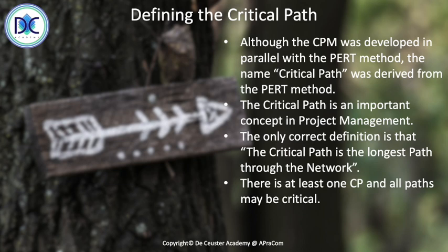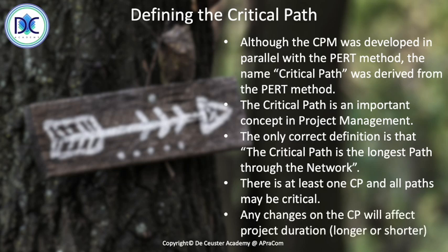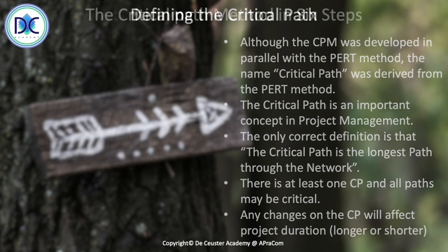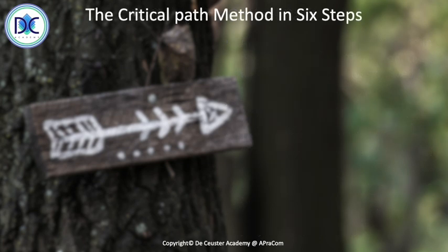The effect of the critical path is that any change on the critical path will affect the project duration. It will become longer or shorter. And in some cases, even the critical path may change. But we will talk about that later in other videos and other lessons. First, let's have a look at the critical path in 6 steps.